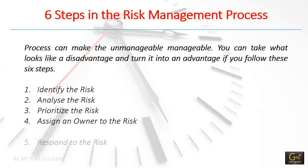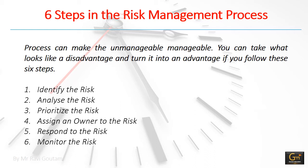So how do you handle something as seemingly elusive as project risk management? The same way you do anything when managing a project — you make a risk management plan. Process can make the unmanageable manageable. If you follow these six steps, you can turn a disadvantage into an advantage: identify the risk, analyze the risk, prioritize the risk, assign an owner to the risk, respond to the risk, and monitor the risk.